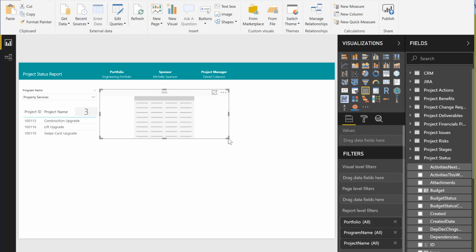If you're looking at the Power BI report and you see broken image links, it's probably because the person looking at the report doesn't have access to your Project Online instance. And so we actually also put the images in a public web library as well. So if you have a public facing website or you have the ability in Azure to upload those images, they all need to have their own URL. And again, they all need to be labeled like red, amber, green, etc.